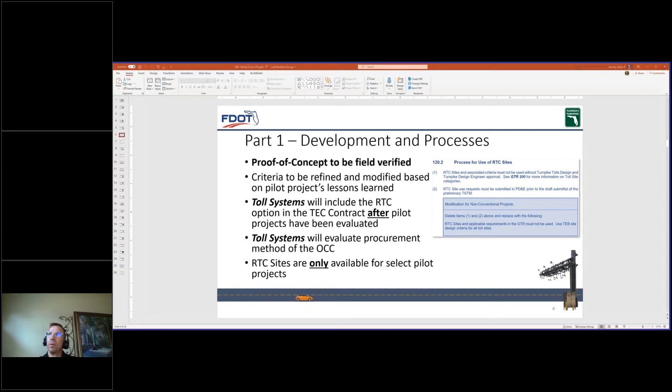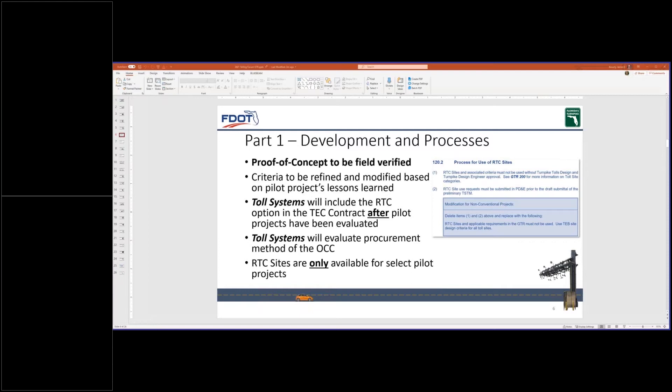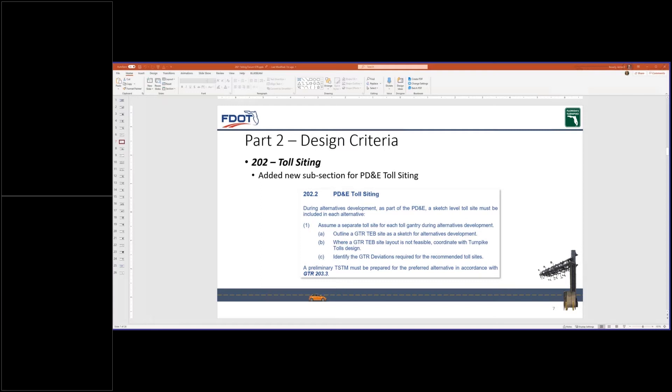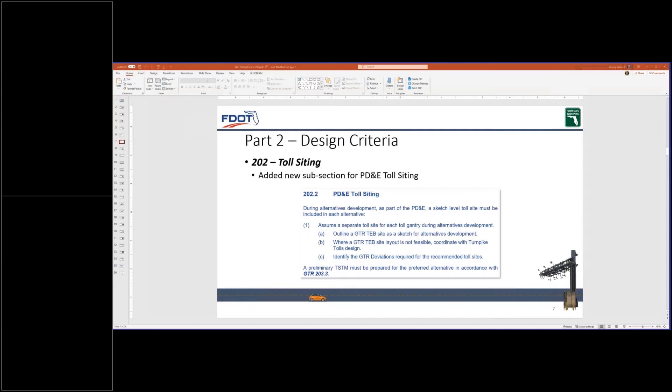Not hearing any other questions or comments at this time, we'll go ahead and move to part two. Thank you. Through lessons learned from recent PD&E projects, it is crucial that any proposed toll site located in the PD&E alternative development are constructible and meet GTR criteria. We have found that having a tolling consultant familiar with GTR criteria on the PD&E team improves viable alternatives while reducing the number of technical meetings.